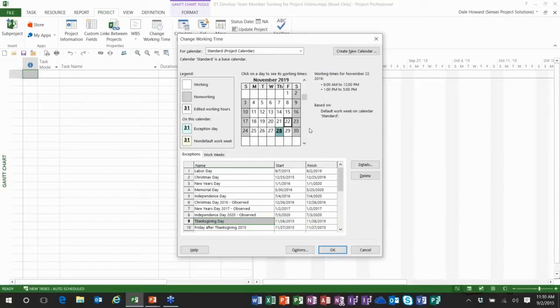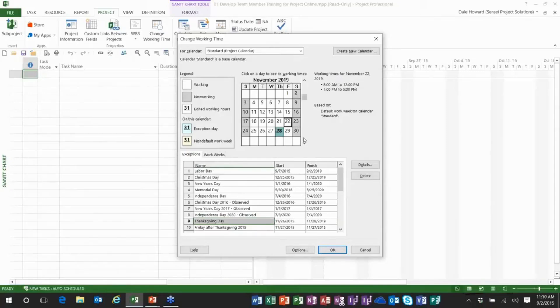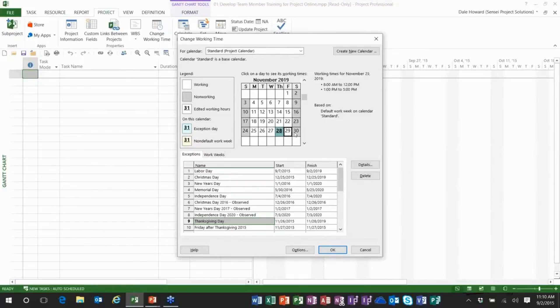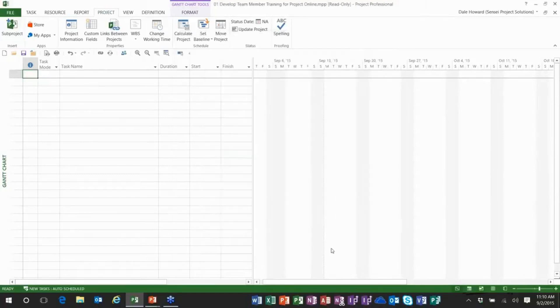So if you create those Friday after Thanksgiving occurrences, what I recommend you do is create them for each year individually. So you can see right here if I wanted the Friday after Thanksgiving for November 2019, it actually would turn out to be the fifth Friday of the month. Now that's how to update the standard calendar.